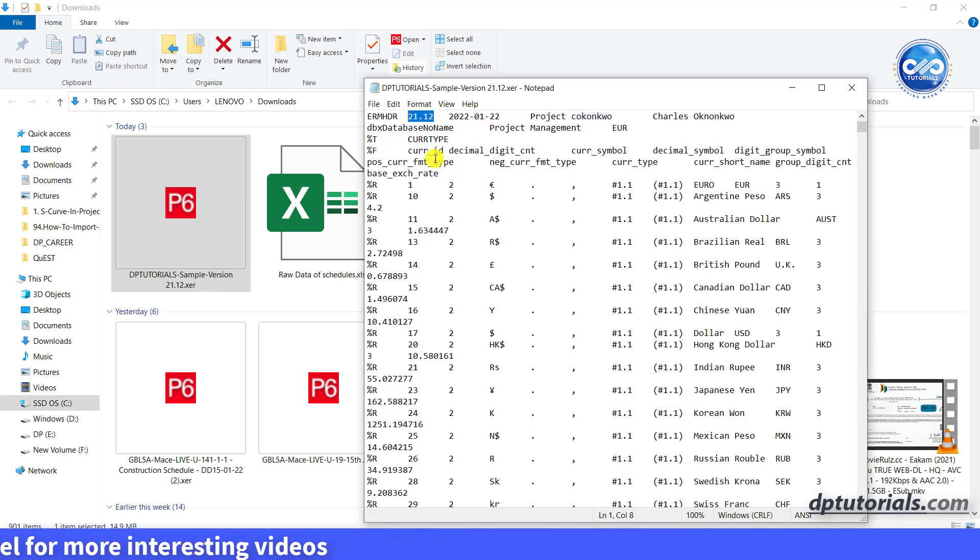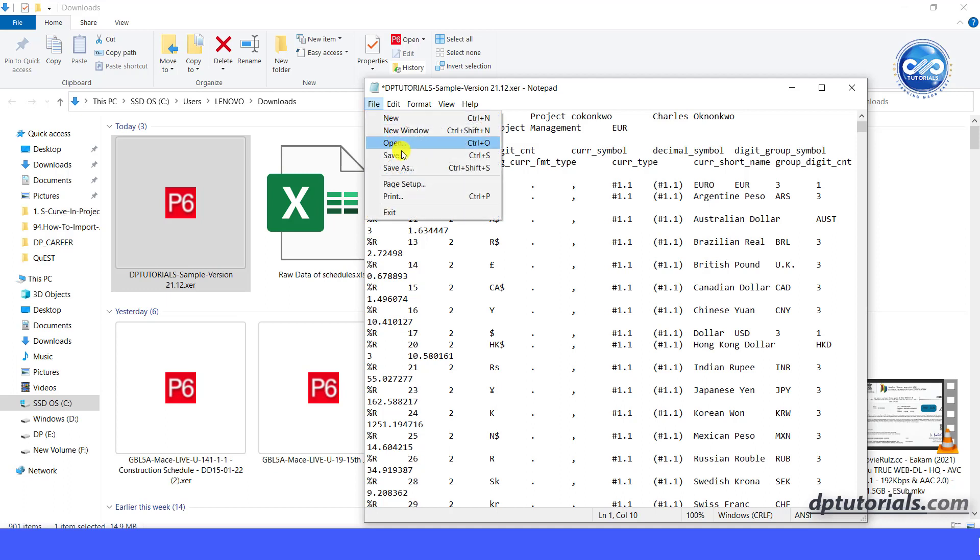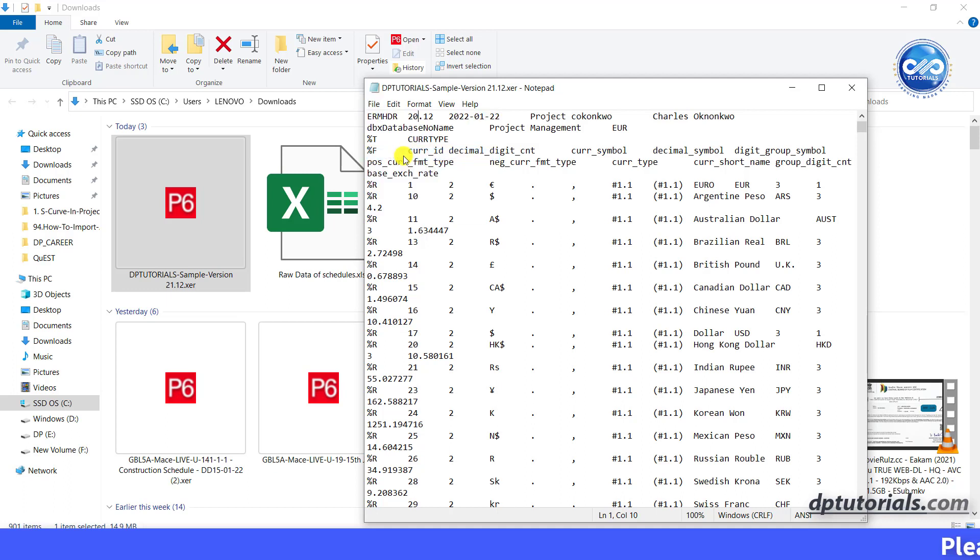Simply change the version number to the version of your Primavera P6 you are importing. Here, I have to change this 21 to 20 and save the text document. Now you should be able to import the XEA file into your Primavera P6 version.